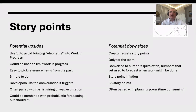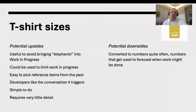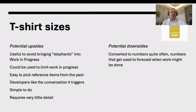T-shirt sizes are much easier than story points and work well combined with wall estimation. They're useful for avoiding elephants and limiting work in progress, requiring very little detail. Despite using T-shirt sizes, though, we always tend to convert them into story points, meaning we end up with all the downsides of story points anyway.